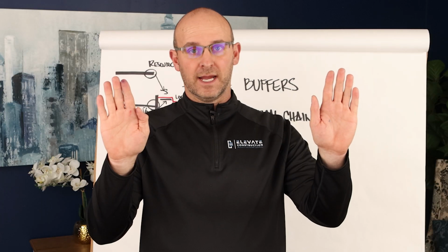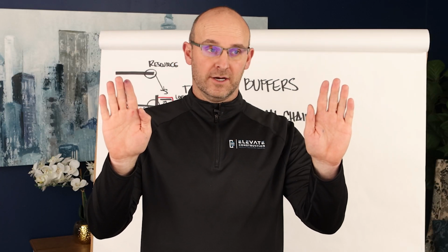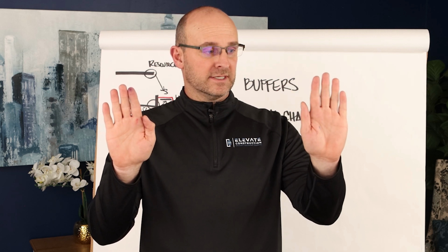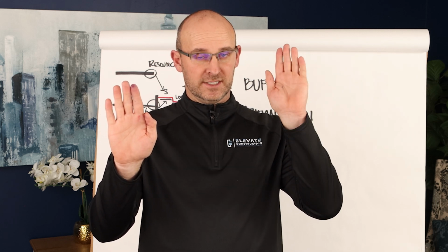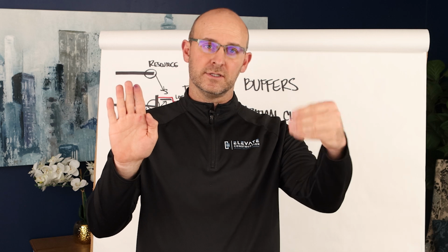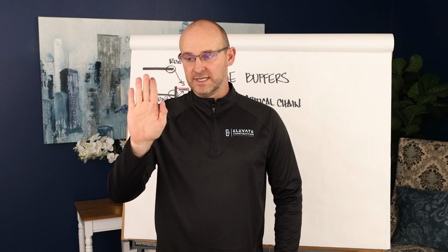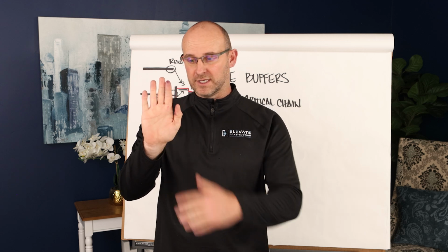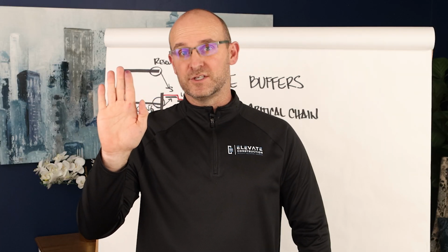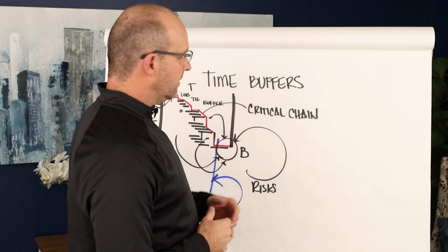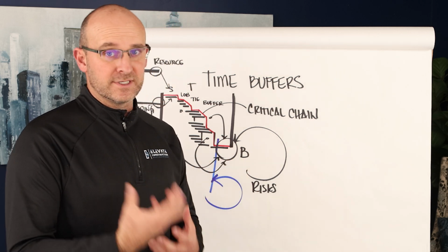Or let's say something happened in the government, or a war breaks out, or some force majeure type thing, or it could even be as simple as an owner or a design change, right? This is non-foreseeable variation, delays, and impacts. Foreseeable would be risks that we commonly encounter, weather that we know is going to happen, possible delays that we've experienced before. These types of things better be covered in the buffer, and we need to protect against it.